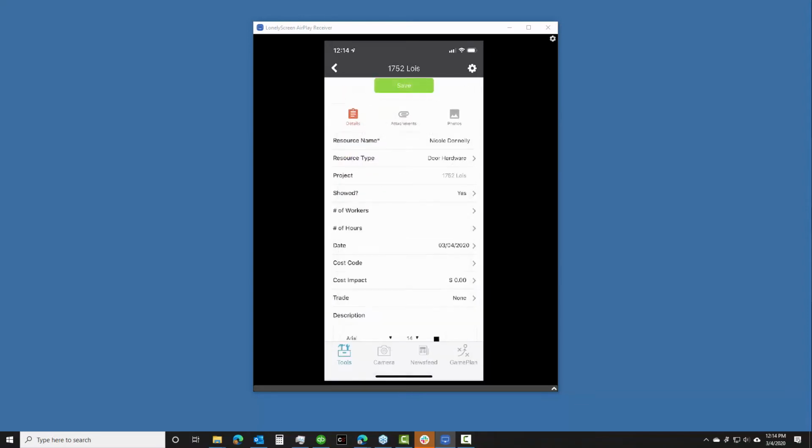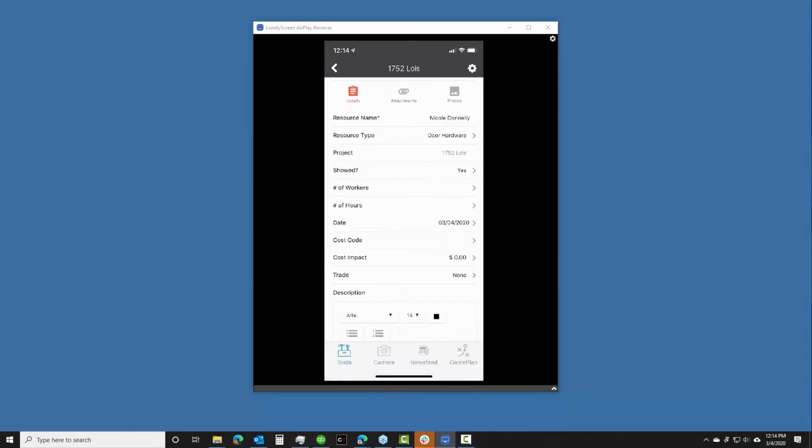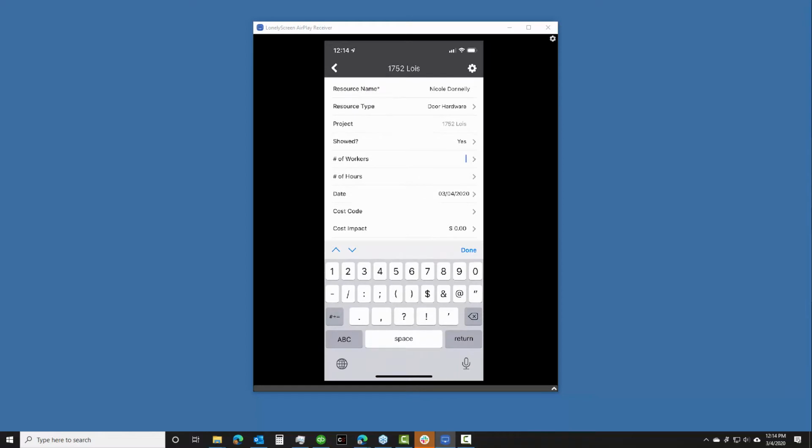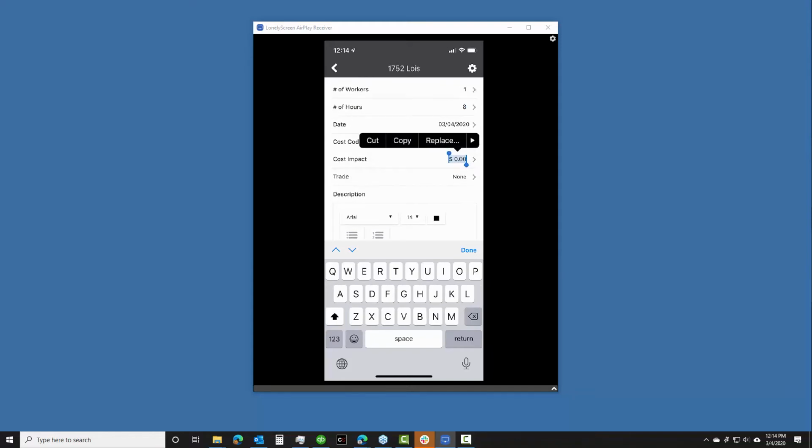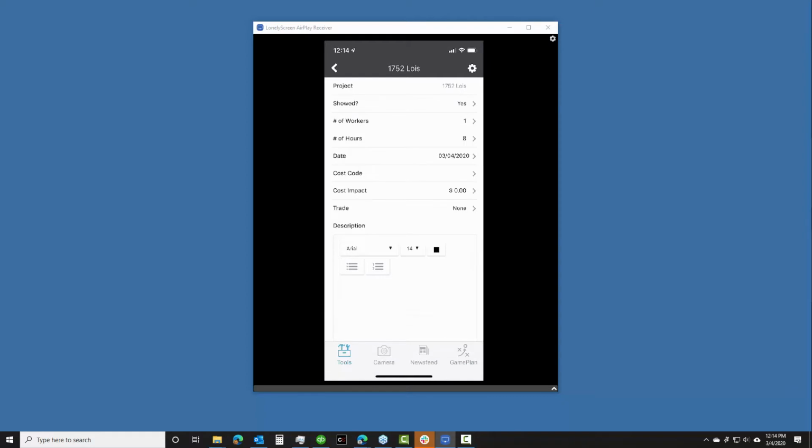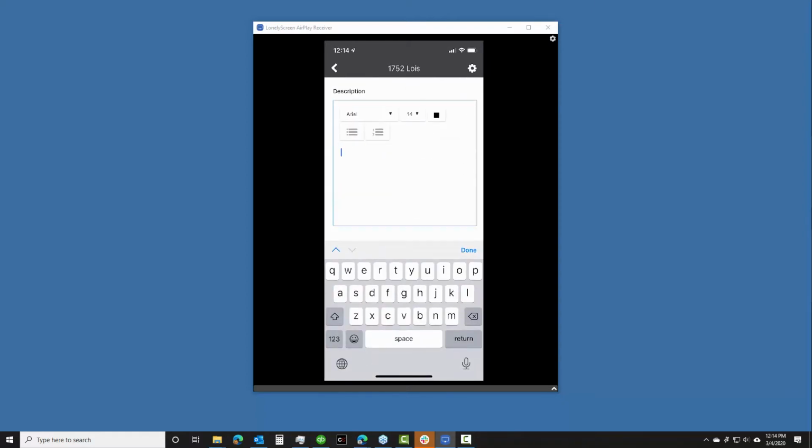When you open up a work log, one of the first things you'll want to set is, who is this work log about? In almost every case, I recommend that the person posting the log should set themselves as the log poster, unless this is a superintendent or site super, and they're documenting work that's being performed maybe by a subcontractor. It's a pretty flexible tool. When you're just getting started, it's much easier for individual team members to just post what they did or what they're observing on site.